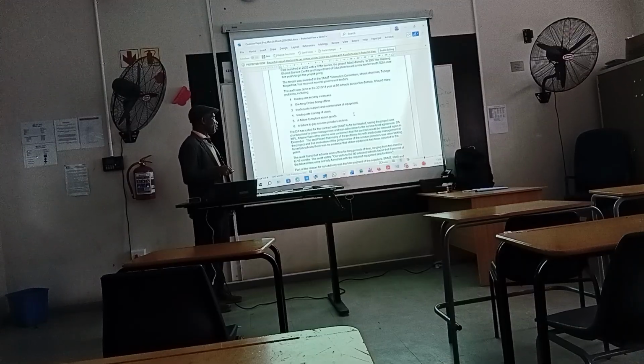The audit found that schools were offline for a long period of time, ranging from 2 months to 16 months. The audit states our visit to the 50 selected schools found that 8% of the laboratories were not fully furnished with the required equipment and facilities.